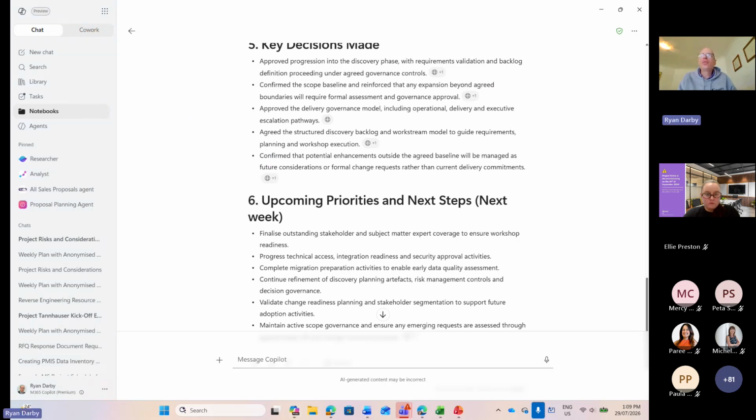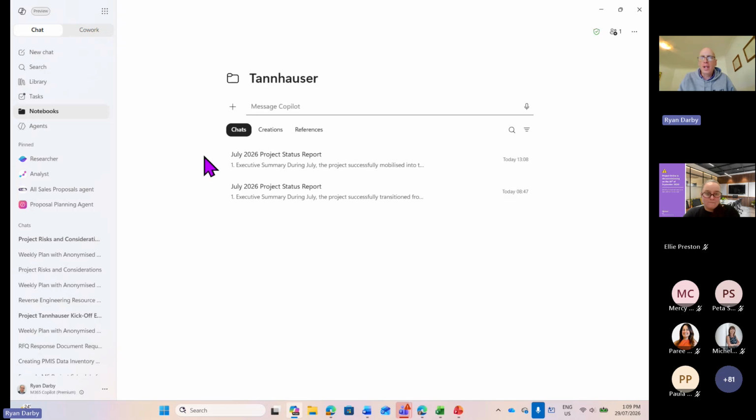Some tips on this as you do it. Your project may run for a very long time, and you are going to find that, like here, I've got 2 chats. They just happen to be identical, but they're 2. Normally, it's like this monthly reporting. You may keep it running forever, but it tends to forget over a while. So you may find that it's easier to create a second chat, or you need to go into the old one, tell it to summarize it, paste that in, and then tell it to look at the current status, because its context window is only so big. It doesn't remember a year back. Okay, so you got to remind it with that.